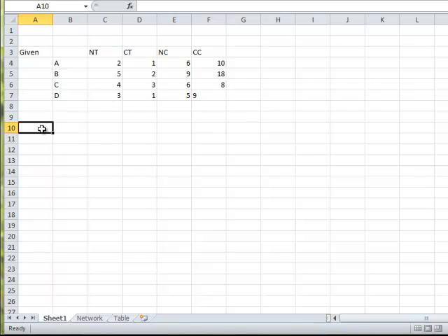Okay, so now we're going to take a look. We put in the raw numbers. This is the raw data we're going to have to use. There might be a little bit more here. There's another number here, and we talk about crashing the system. Crashing the system means shortening the time, trying to race things through. But there can also be a situation where you run past the end of your process and you're late. So the problem does talk about the fact that in the area after the process normally finishes, we start having an issue where we're paying higher indirect costs. So these are the direct costs. The given numbers are direct costs that happen during the process, and there is also indirect cost.